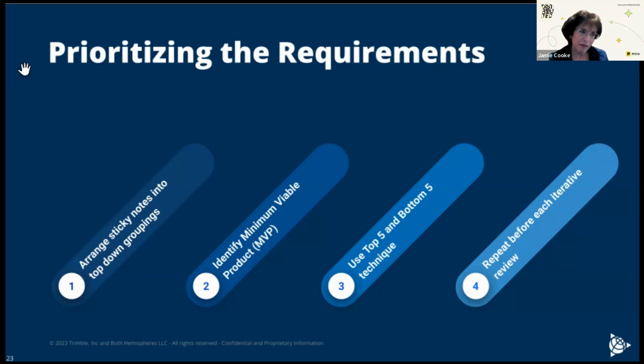The last thing I want to emphasize, there's a tendency for teams to build a backlog once and then sort of leave it stale. Each planning session becomes a revisit of the top 3 items in the previous session and not a revisit of the whole backlog. It might not have to be every time, but it's worth regularly revisiting and refreshing, because things are going to change in your organization and outside the organization. That's the nature of Agile, to support that, but you've got to replicate that in the product backlog.